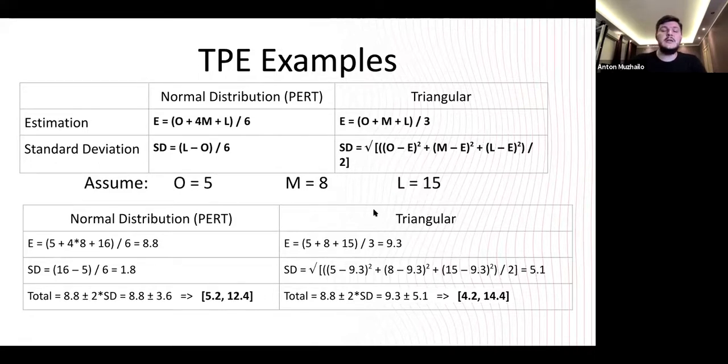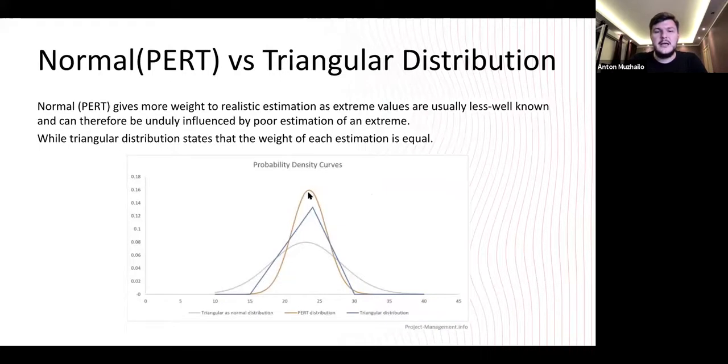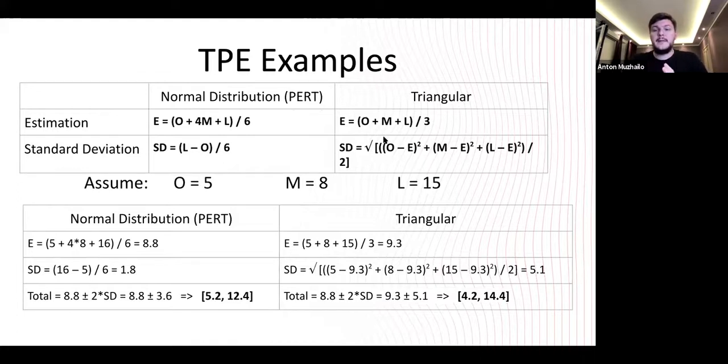Because if you use noisy data on PERT, then you will fall into this high curve, but with a small width, and the standard deviation will be crazy. So rule of thumb, if you have many data, if you have almost everything you need in a good quality, in a good precise, you use PERT. If you don't know everything, don't have data, have incomplete, noisy, uncertain data, use the triangular approach.